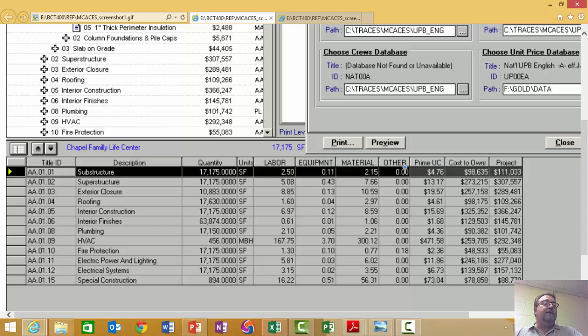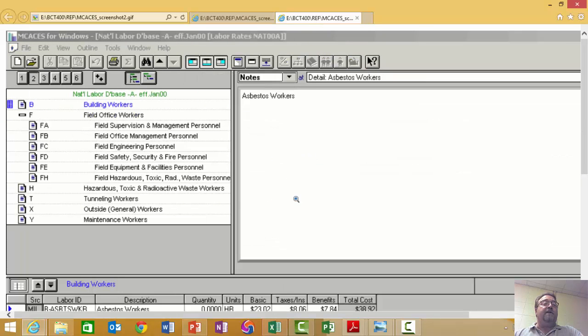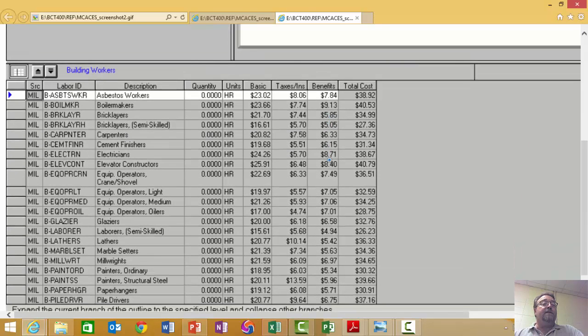Okay? It also had a place, sometimes you're going to need tables for your resources, your material resources, your labor resources, for both the estimate and the schedule, because I'm wanting you to resource load the schedule. Okay. I think I have this database. I don't mind putting it up, but it needs to be tailored to local conditions where your project is. That's something that you need to put in the basis of estimate.